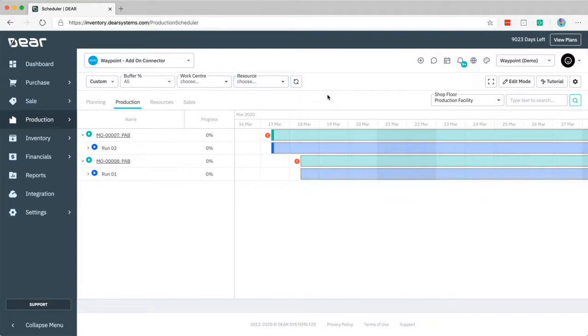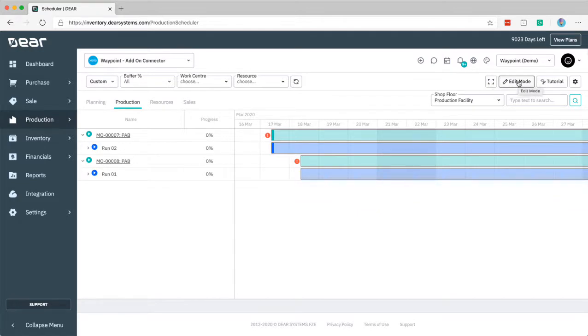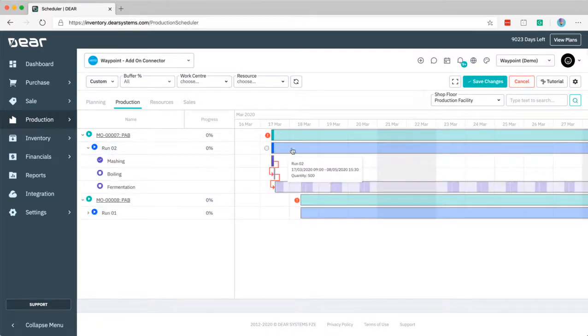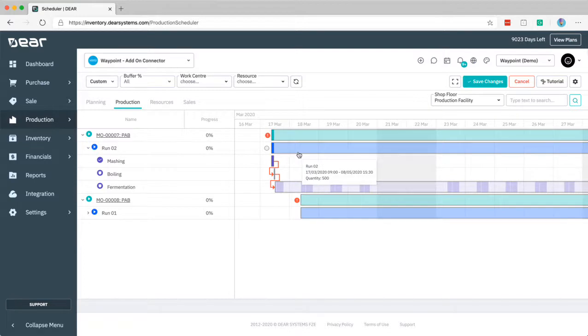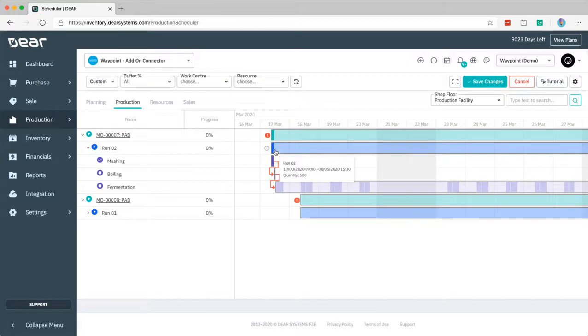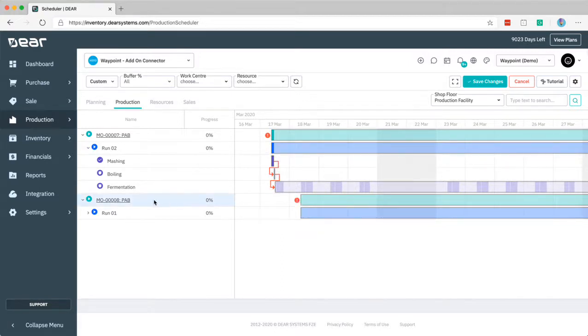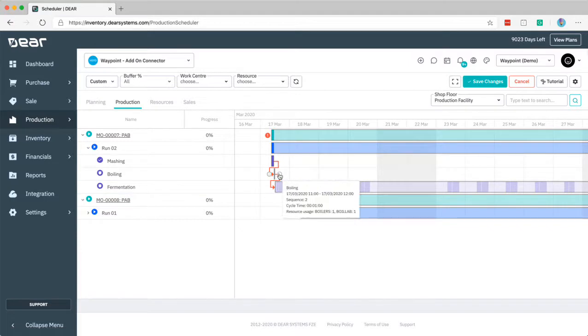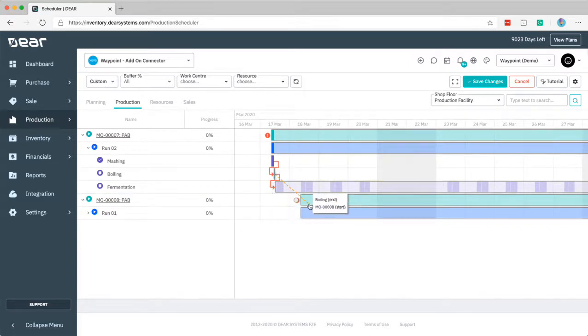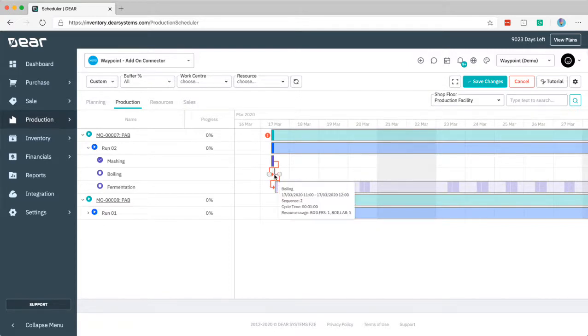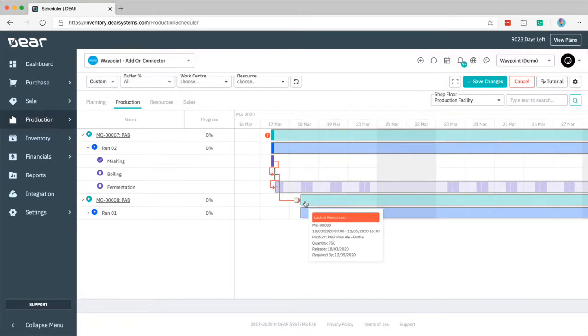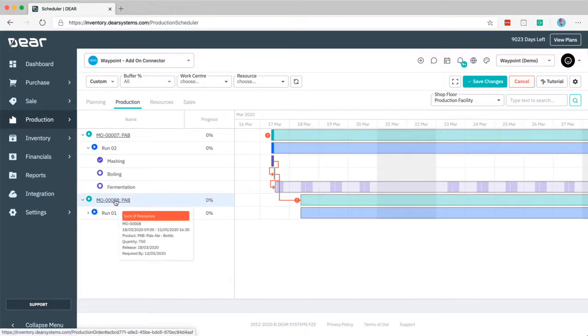Another thing to be aware of is you have the full screen mode which will bring this particular view into full screen. We have an edit mode which is currently still in progress. What the edit mode will enable you to do is adjust these particular stages or the production modules. Maybe you could drag and drop and move them around and create new dependencies. For instance if we wanted this particular production order to be dependent on the boiling stage being complete we could create a dependency there which would mean this is dependent on it, which will mean the scheduling will react to that.